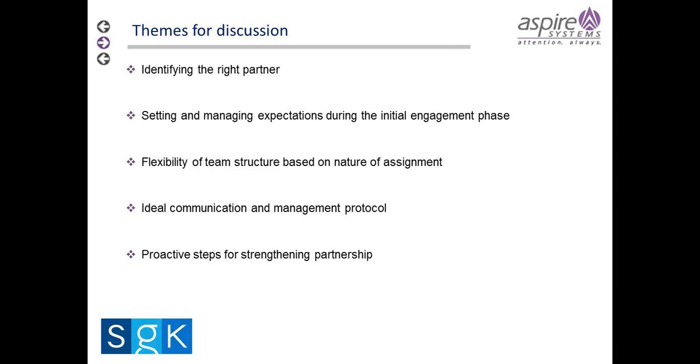From the onshore-offshore side, the rule of thumb for us would be about 80% offshore and 20% onshore. That's where you start from, and that's what I consider normal. But we might have something with a lot of complex business analytics. We've got a project right now dealing with complex equipment called spectrophotometers, color algorithms, and ink mixing, and it's very detailed.